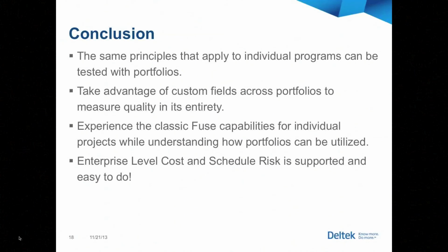The same principles that apply to individual programs in the suite can be scaled up to your portfolio. Number 2, and I can't emphasize this enough, and I'll show you exactly where to find that article that we've written, take advantage of custom fields across portfolios to measure quality in its entirety. That was that location field followed by that manager field that I used. If I didn't have a consistently coded location field across my portfolio, I would not be able to do that level of portfolio analysis.